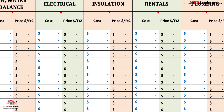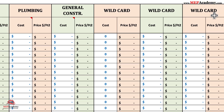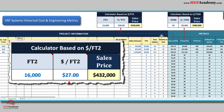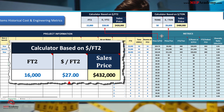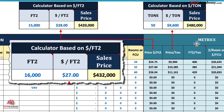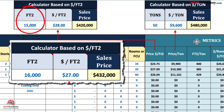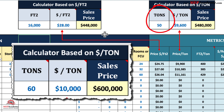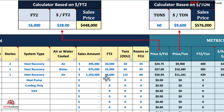Budgeting and pricing made simple. The spreadsheet also includes two quick calculators designed to simplify the sales pricing process. 1. Cost per square foot calculator: input the square footage of a proposed building, and the spreadsheet instantly generates a sales price based on your preset cost per square foot — perfect for preliminary estimates during early project discussions. 2. Cost per ton calculator: enter the required tonnage of refrigeration, and the spreadsheet provides a sales price based on your chosen cost per ton, ideal for HVAC professionals who need fast, reliable pricing at a moment's notice.